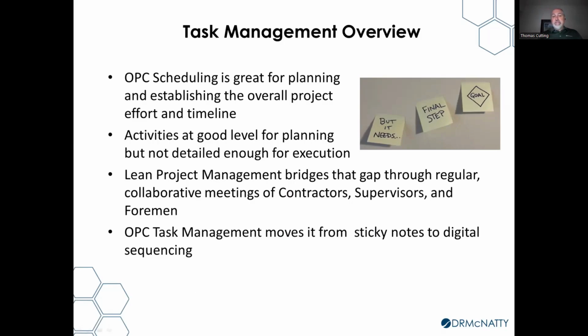Another term for these sessions historically has been called pull planning meetings. Pull as in pull with a rope. Teams use different colored sticky notes to identify the tasks they are responsible for and the things they need to happen before they can accomplish those tasks. OPC introduced task management to facilitate those working sessions. The idea is we're moving from those sticky notes to a digital sequencing collaborative effort online.